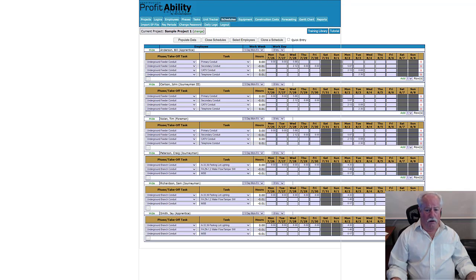And I watched this for probably a month. We can't run our backfill crew on MV and DC today because we don't have any sand. So, we're going to have to put those guys somewhere. They don't want to not work them, which would probably be the smarter thing to do. But they don't want to do that, and I understand why, because those people are exactly the same. They can go find a job down the street where they can work every day, and you start laying them down a couple days a week. It starts hurting their paycheck, and then they go, you know what, I don't want to work at that site anymore. So they got to keep them busy.